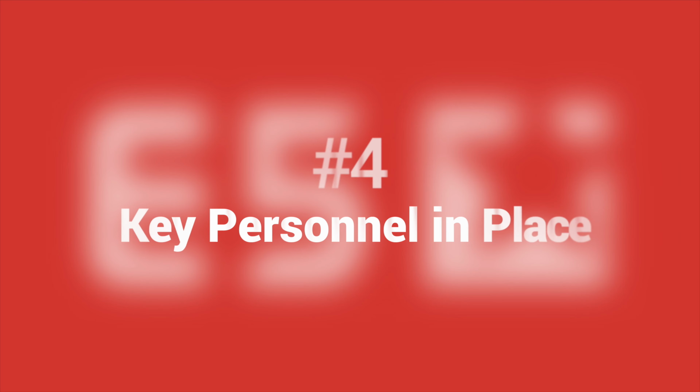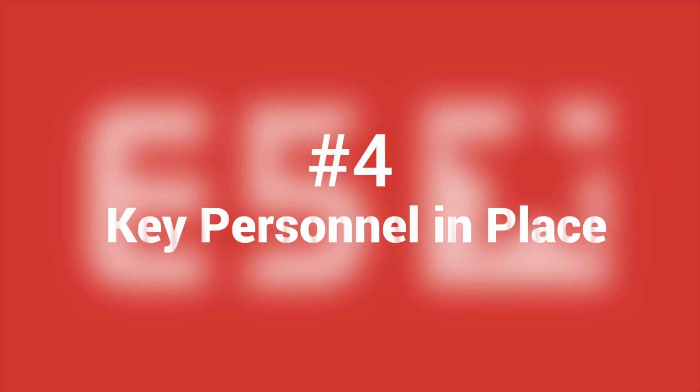Tip 4, ensure that the key personnel are in place, in addition to the design and consultant team. So make sure that the principal accountable person is identified for the purpose of the application process, and also your principal designer for the purpose of the building regulations. So just make sure that the key people involved in the project and the application process specifically are in place.